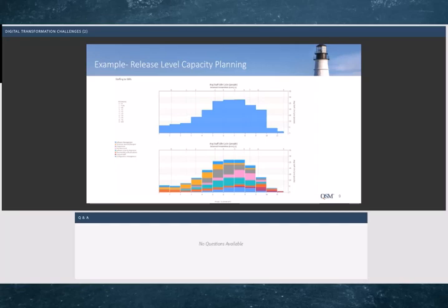Now, the productivity index, we're going to be talking a little bit more about this. You'll be hearing this as we go forward. The productivity index is calculated based on historical data. Once we know on a project that's been completed, or a release or product delivery, how much functionality was delivered and how much time and effort was spent, we can calculate this productivity measure. The productivity index takes into account the overall maturity of the process, the tools and methods you might be using, the complexity of the work, and the experience level of the people.